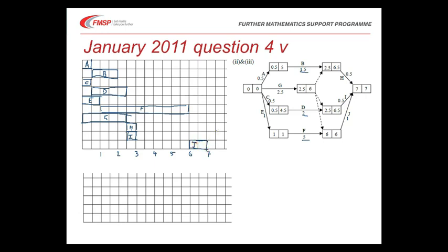So there's my cascade chart with things starting at their earliest time. I now, thinking that B, D and F, so basically these three activities don't require someone on task, need to move things around so things don't take longer than 7 minutes, but I'm only using one person at once. So the first thing to say is that E, F and J are our critical activities, so we're going to put them along the bottom.